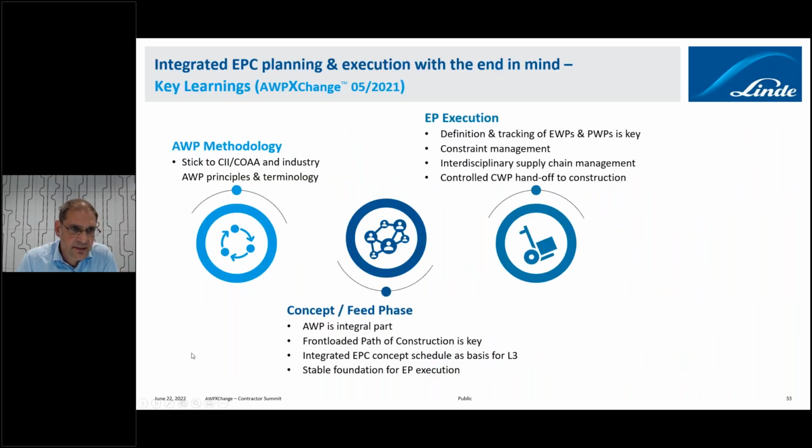Let me get to the next slide here. This is just a brief summary from my presentation last year when I was talking about integrated EPC planning and execution. We heard this also from Jay before. It's very important that AWP is not only started when it comes to the finish line, to construction. I would elaborate here once again that Linde's understanding and also our processes are set up so that AWP is an integral part starting from the concept phase, where we do the front-loaded part of construction, where we first set up an integrated EPC concept schedule.